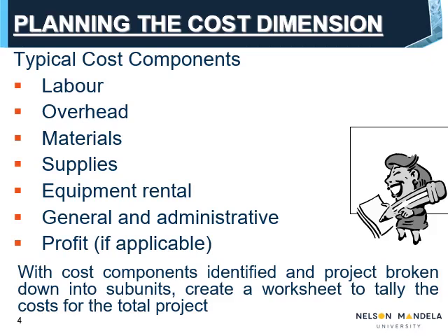Materials. This represents the cost of items purchased for use on the project. It includes items such as timber, cement, steel, nails, screws, rivets, bolts, and paint. Supplies. This makes up the cost of tools, equipment, office supplies, etc., that is needed for the project. If something has a useful life beyond the project, its cost should be prorated.